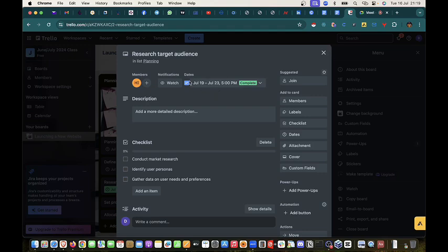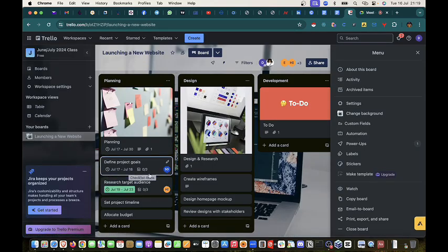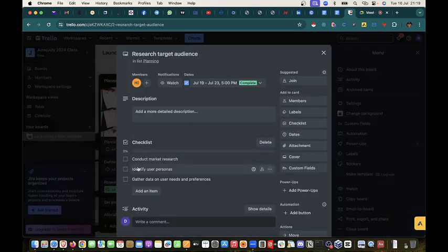Okay. I just need one of you to complete what I'm asking. The reason is that I told you earlier that these are 3 checklists under here. Once she ticks this first one, you will see that this percentage level will increase. It will tell you 33% complete. If she marks the second one, it will show you 66% complete. That's what I need.